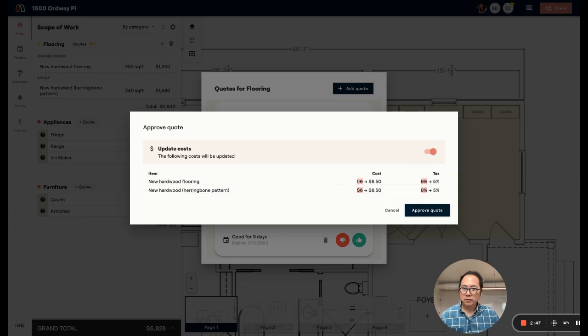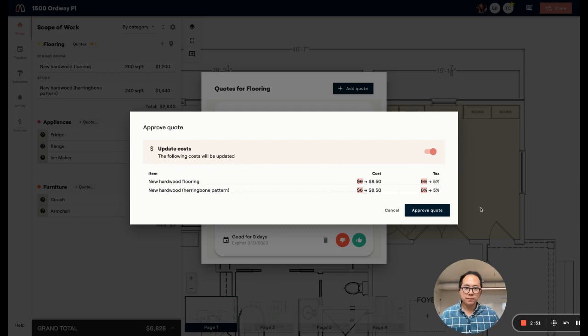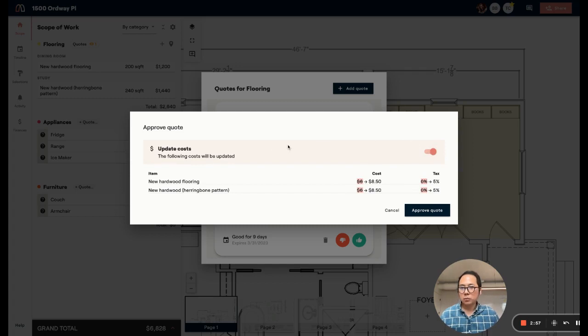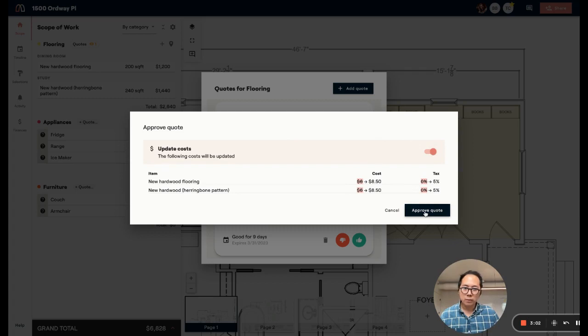That $6 I'd originally put in is going to be updated to $8.50 and there's going to be a tax rate applied now, which I didn't put in originally. Of course, you can always turn this on and off. But in this case, we're using these quotes to help firm up the pricing for our project. So I'm going to go ahead and approve that quote.